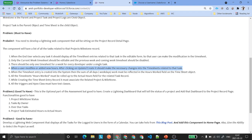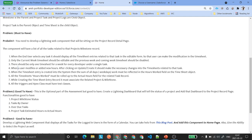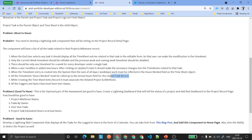I will show you how the UI is going to look. When the timesheet entry is created in the system, the sum of all hours worked must be reflected — that's what points four and five cover. All the timesheet hours worked must be rolled up to the actual hours field for the related task. Also, while creating the timesheet entry record, it must associate the related project and milestone.